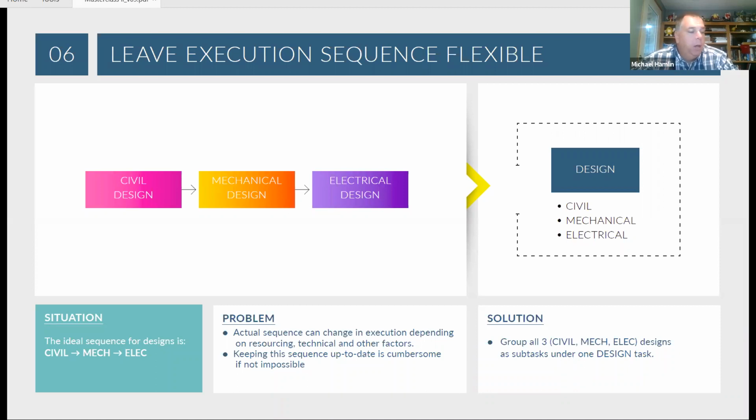We've used this many times in aircraft, aerospace manufacturing or design, right? Where you have a lot of different engineers working, from structural engineers to electrical engineers, mechanical engineers. Instead of having each of them working independently, we now focus them to work together on one design task. We identify all the subtasks that need to be done, and they work in this collaborative group mode, if you will, all working on the same priority to get one section of an aircraft designed or an entire wing designed all together.